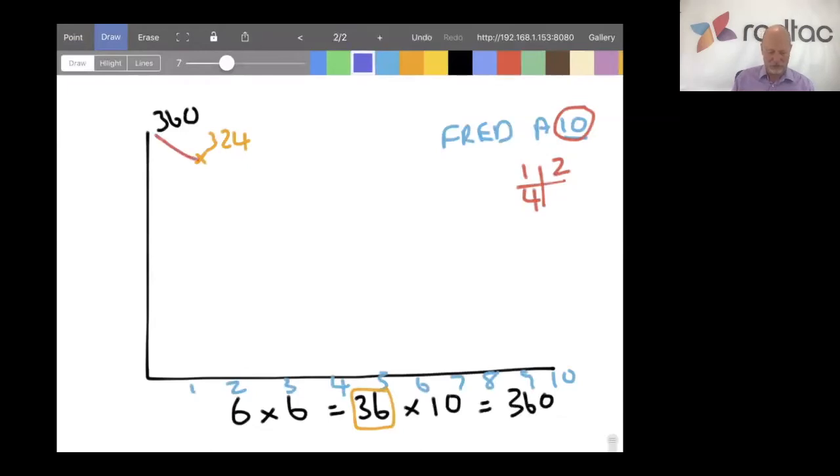Oh, by the way, I should have mentioned there would be a planned effort line going down like this, which is, you know, if we're on target, we will be on the planned effort line. So Fred has spent 6 hours, 4 hours left. That looks like we're on target. So everything's tickety-boo. However, on day two, Fred starts once again on this task A, and something blows up in his face, and he's now saying there are 15 hours left.